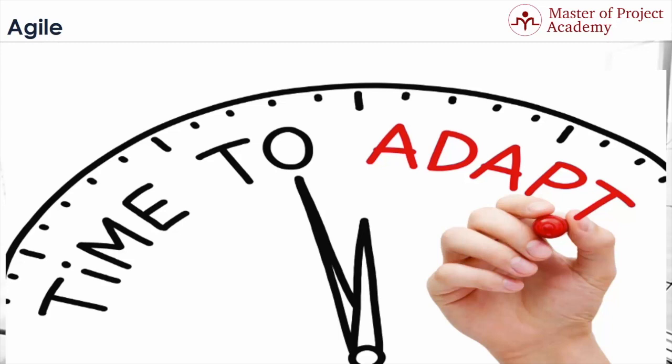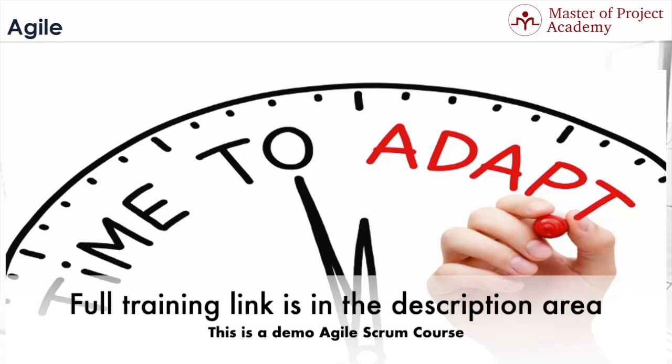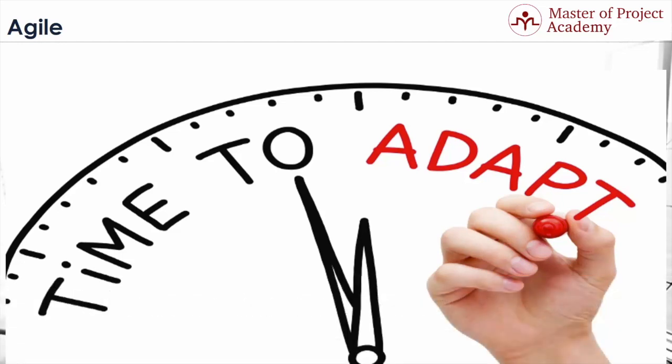However, during design and development, when a new customer request comes, analysis must be done for the request, and revision of the rest of the tasks should be done from the beginning to adopt the changes. This causes loss of time. And even worse than this, until testing starts, the customer does not see the delivery of the project, and this brings a high risk since lots of effort is spent still. Because the customer can come with new requests, or its requests might change over time during the project based on the marketplace conditions or other circumstances.